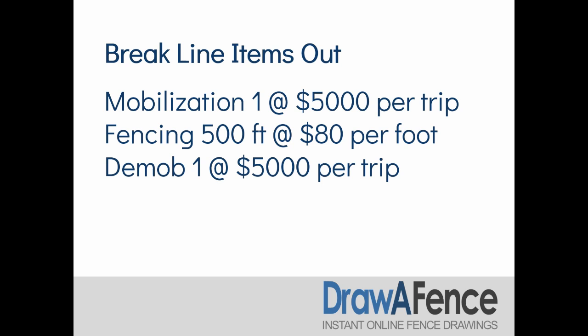Also, if you are on a longer job where the client does say, right, we're not quite ready for you to do this work, so you need to leave and come back, you've got your mobilization and demobilization rates ready, so they know what they're going to be paying, and you can put that directly into your progress billing, so you'll get paid for that.